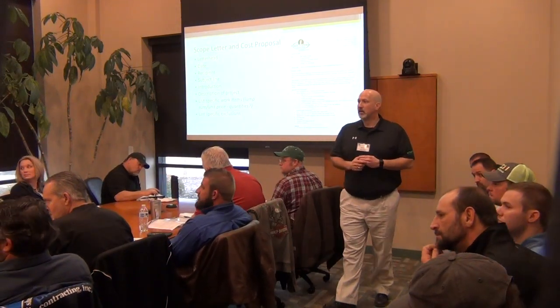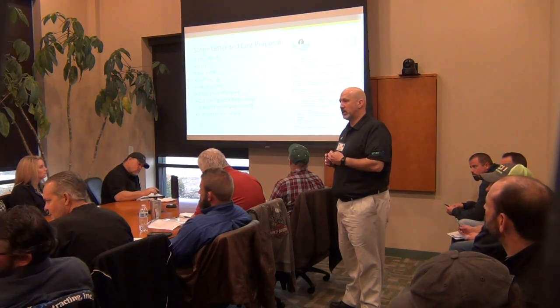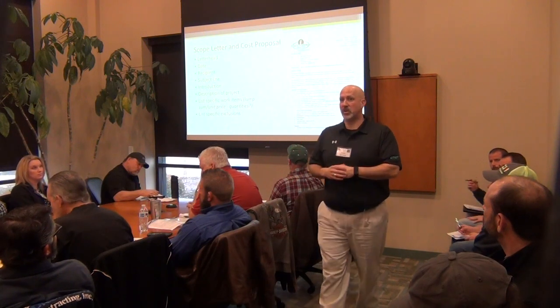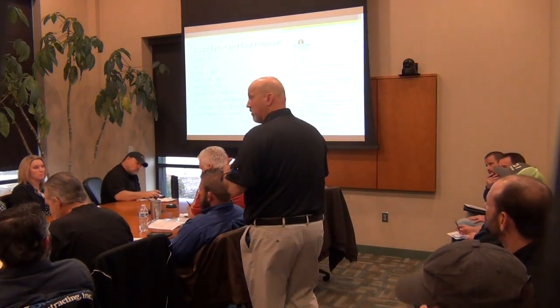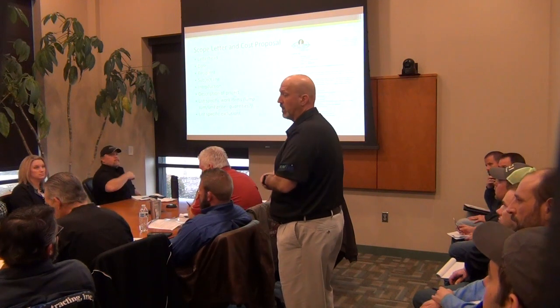Kevin, you send your scope letter early to the GCs? We do. We try to get it to them at least 2 days ahead of time. When we're acting as a sub, which we do, we're not strictly a general contractor. We do mechanical work as a sub, electrical work as a sub. If they don't set a date, we send 2 days ahead, but if they want it by a certain date, we try to comply.